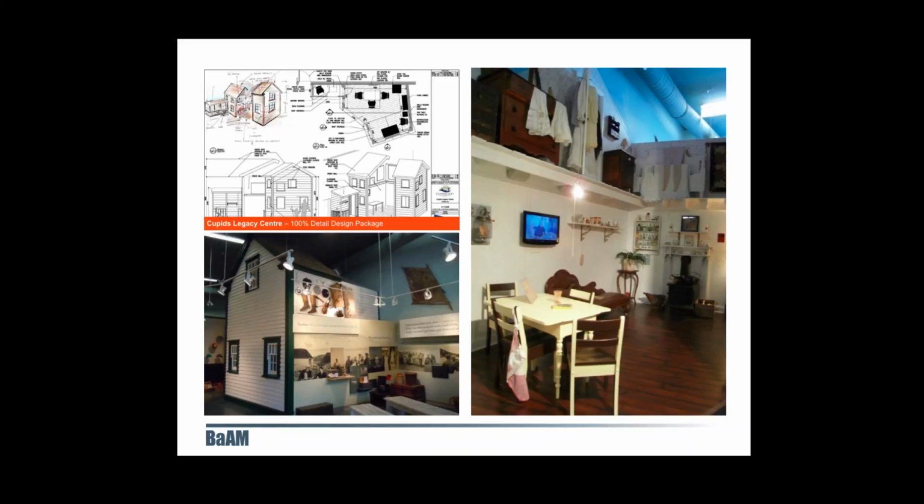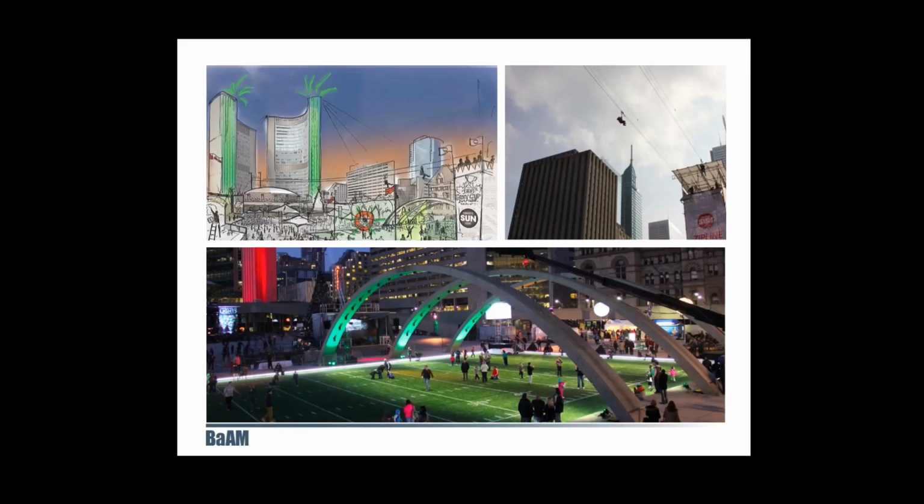The timing of the milestones should be determined at the outset as part of the project kickoff and project chartering stage. And milestones become a crucial point within the project for gathering feedback and progressing to the next stage of development. BaAM's event work follows guidelines based on our project development process as well. Just as we would expect to kick off a project with a project charter for a permanent exhibition, we do the same with an event.